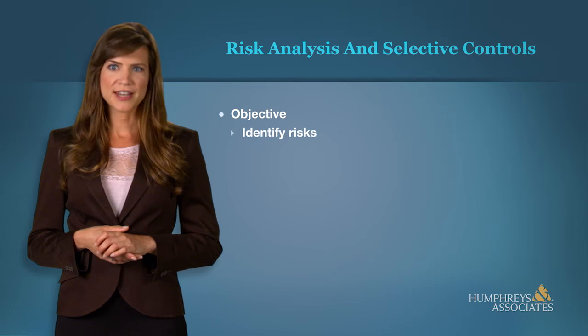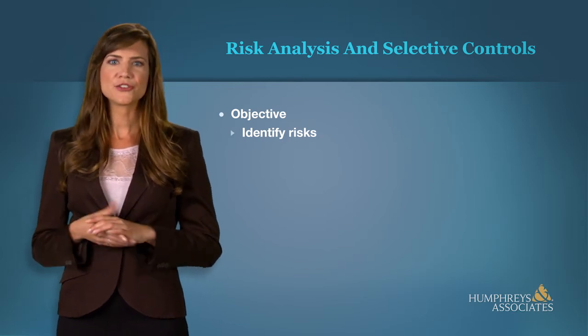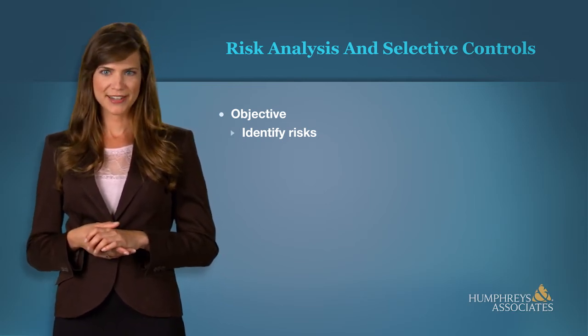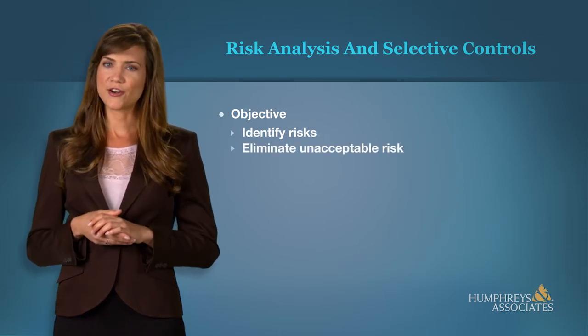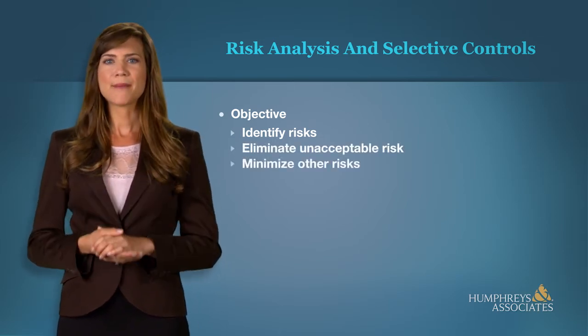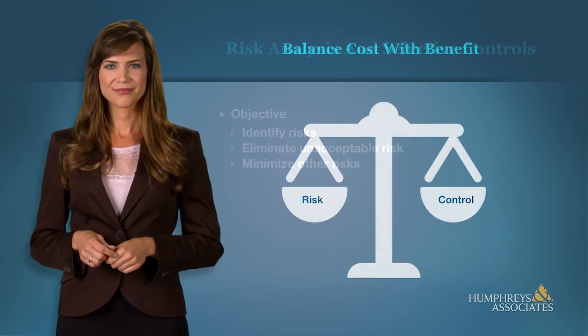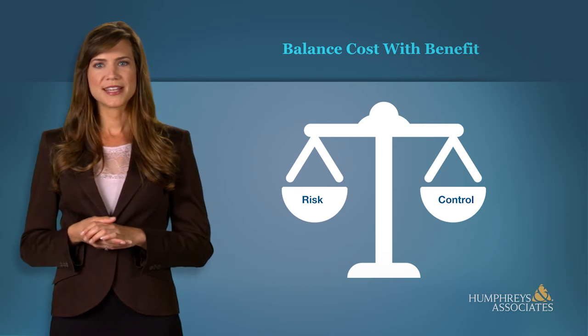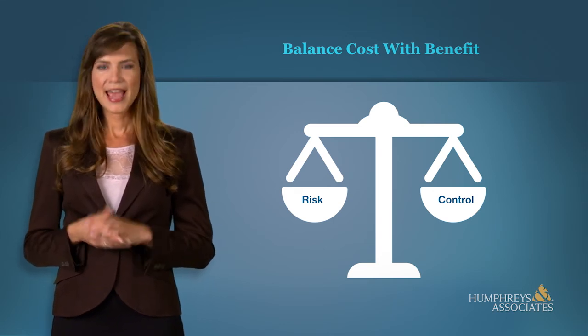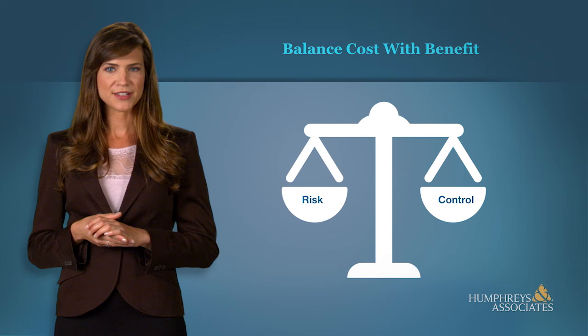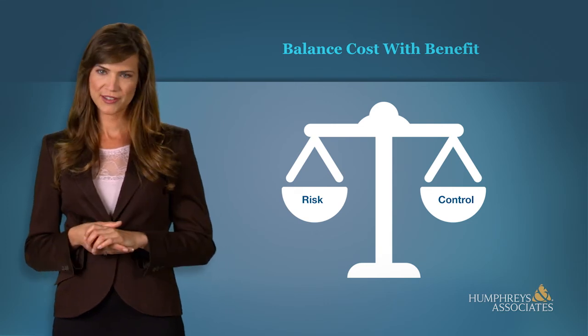The objective of the analysis is to identify and understand the risks associated with the project, eliminate those risks that are not acceptable, and minimize the impact of the remaining risks associated with the acquisition. The use of controls is done on a selective basis and is determined by the cost and benefits associated with the controls. It would not be logical to expend $100,000 to develop specific capabilities that may result in less than $100,000 in cost savings.